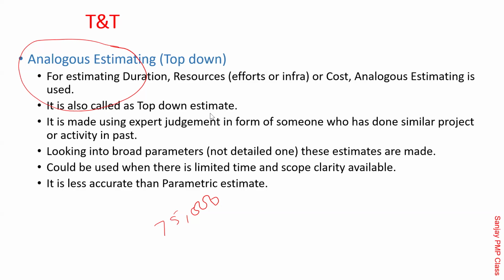It does happen, Rahul. Those people have that ability. They will understand what the material is, what the processing is, what the finishing and packing cost is, take it all into account, and calculate 15 rupees per piece. That type of calculation is called analogous. Analogous is used very extensively all across the industry. Is it also used in the IT industry? It could be. Don't even think that it is not used there. There are places where analogous estimates are used. This is a very fast estimation method, but obviously it is the least accurate. It's not very accurate. Correct, friends?